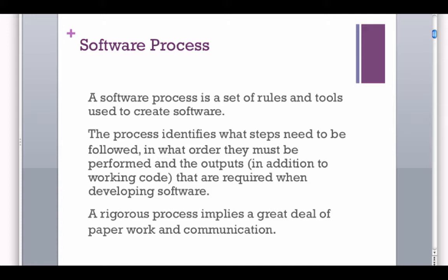One process, for example, might require that you do a formal design document after the design phase. In addition, we should review that document. There should be a peer review of the document. And in this particular process, we need some sort of electronic defect tracking system where summaries are available 24 hours a day at any location. Another part of the process might be that there must be a software quality assurance team that oversees the output of each of the phases.